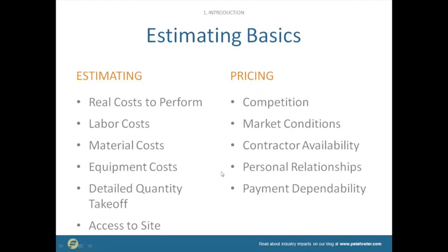And let me pause here and just say, if you're the owner and you have a personal relationship with a contractor, that tends to make the prices of the construction go down. Generally, not always, but generally, a personal relationship between the contractor and the owner tends to make prices go down. But it's very different if the personal relationship is with the owner's representative or the owner's agent. Personal relationships with owner's agents or representatives tend to make prices go up.